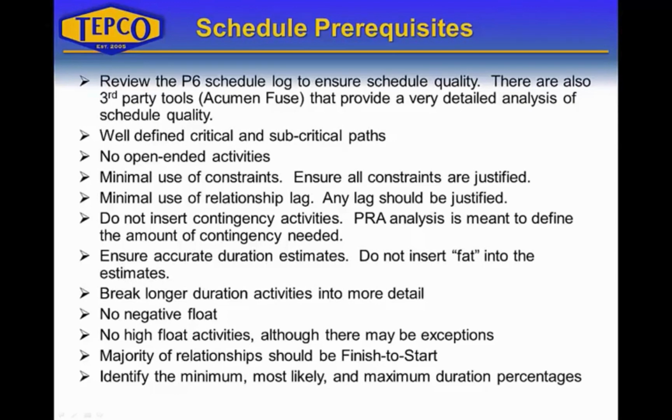Do not insert contingency activities at this time. The reason we're going to run Primavera risk analysis is to define what kind of contingency we may need, at least from a duration standpoint.